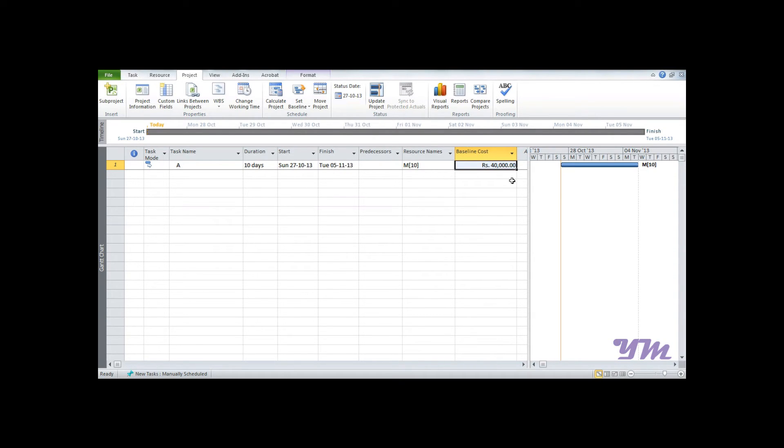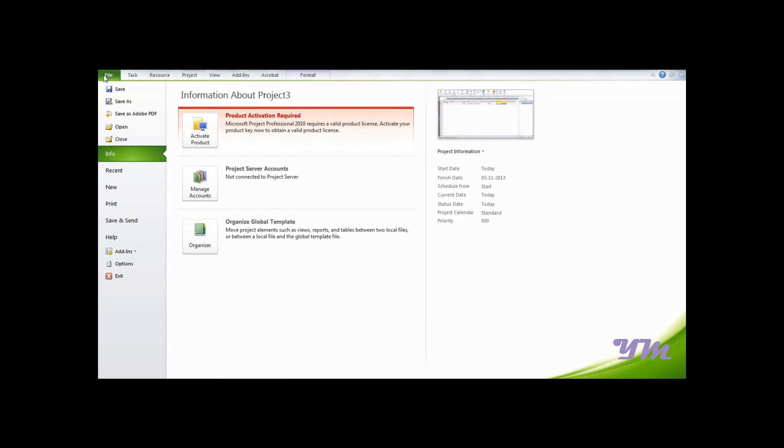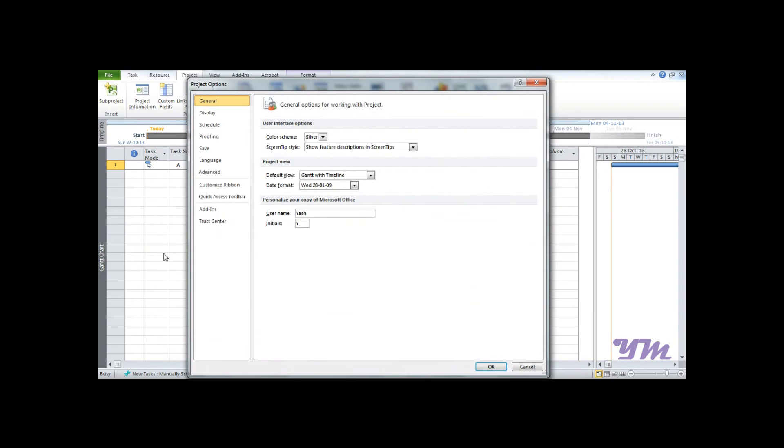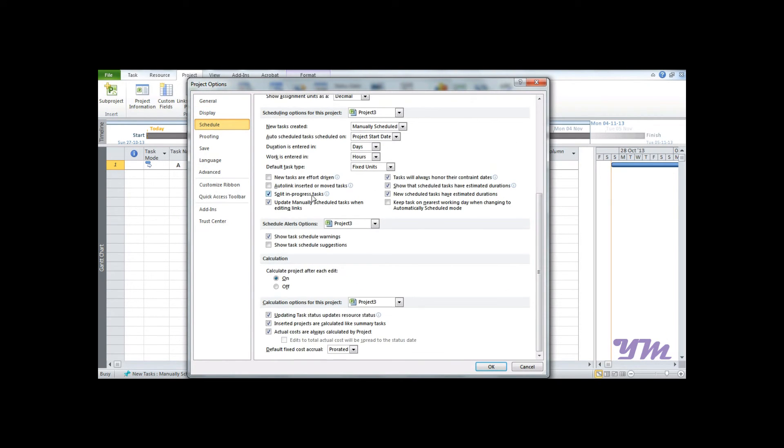Before starting work further, make sure you do this: go to the File menu, go to Options, Schedule, scroll down to Calculation Options for this project, and make sure you have deselected the third option, that is 'Actual costs are always calculated by Project.' After doing this, click OK. Please don't forget to do this.